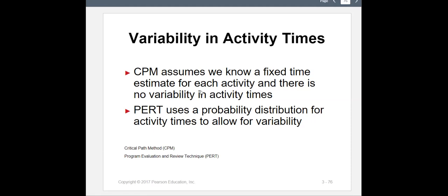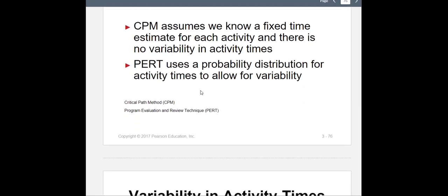It has an average, an upper bound, a lower bound, and if the numbers are normally distributed, then we can find the standard deviation and say with 95% probability, or with 68% probability, this is how long it takes for this project to finish. So sometimes your manager will ask you, with 99% probability, when can you finish this project? Then you can numerically calculate it and tell them, and that would be pretty much accurate.